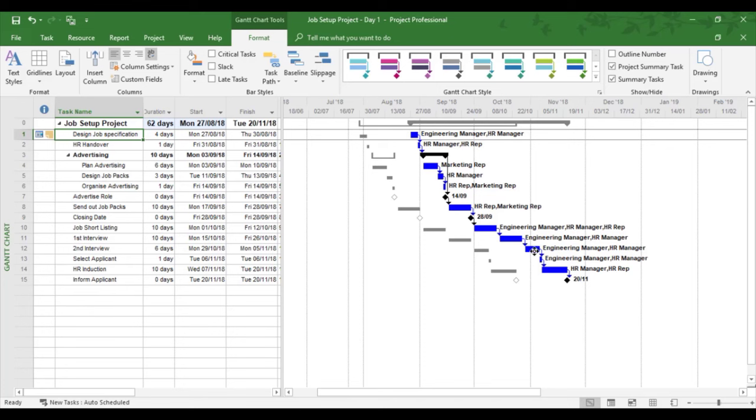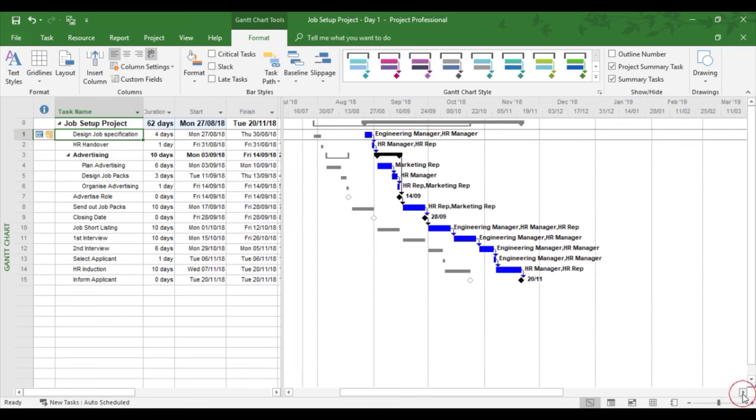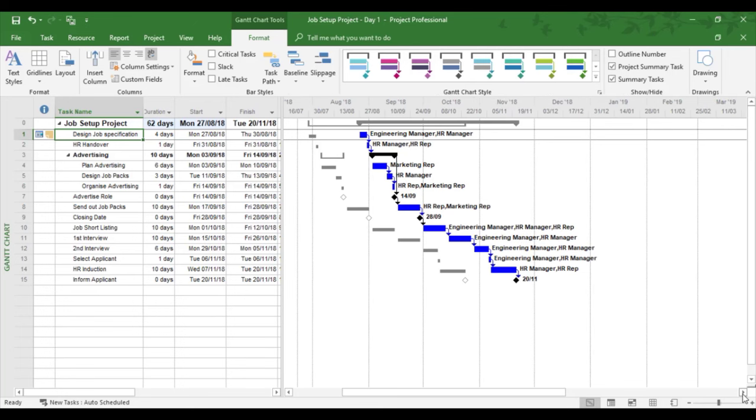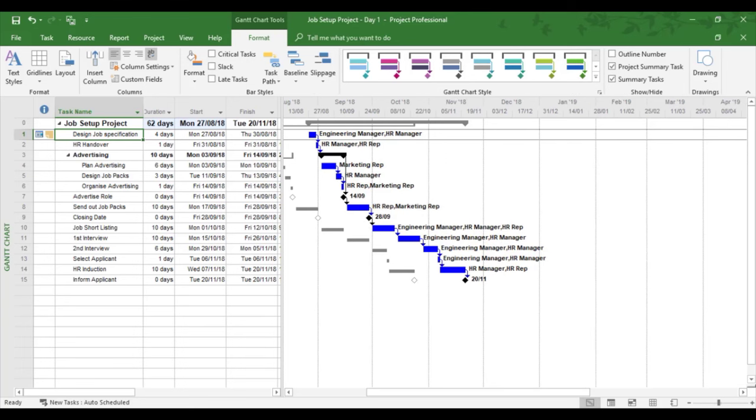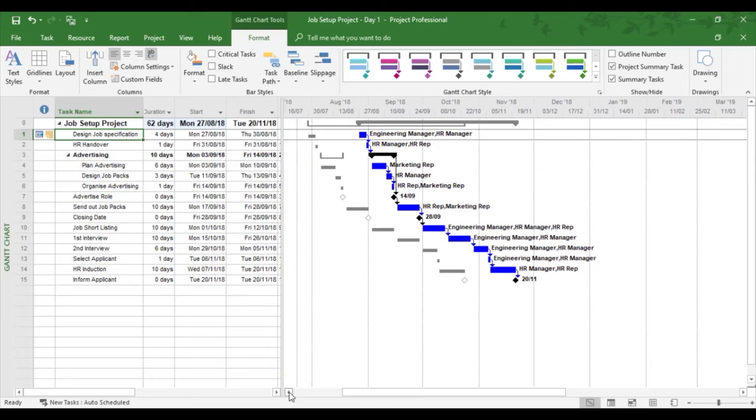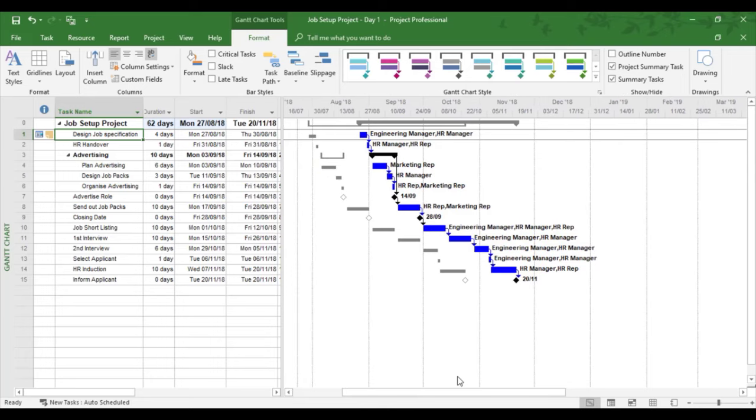Now it's shrunk enough to show everything within the graphics. The gray is the baseline where I should have been. The blue is the actual project where I am now. I can see all the resources. I might try and get this pretty close to the dividing line. That's good enough.